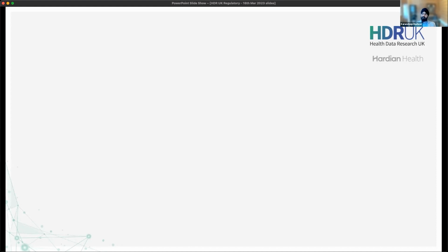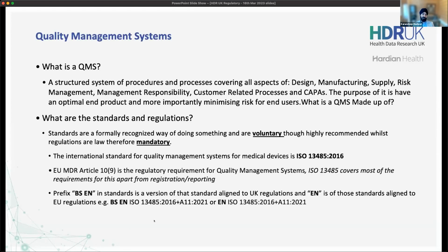Number 2, of course, there is time when it comes to these certificates. So, for example, if you wanted to go for ISO 13485, the notified or approved bodies, or even a certification body, is going to make you wait anywhere from 3 to 6 months. So the earlier you begin that process, the better off you are, rather than apply and then try to do it in retrospect.